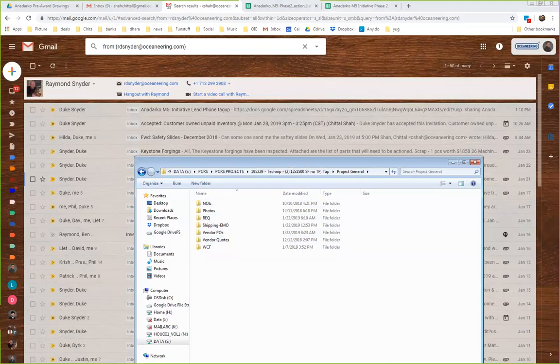So the PM would work that into the schedule, and he'll say, okay, these are the items. Even in kickoff there's a section for long lead: these are the items I'll need you guys to focus on. So they focus on that and get that out first. Then for the rest of the items, there are going to be time triggers for when they're due. But there are things like elastomers and bolts and nuts. If they're released, they'll go and buy them. We'll keep them on the shelf, even though we don't need them. It's better to have it and not need it than to need it and not have it. I think you said that a few days ago, right?